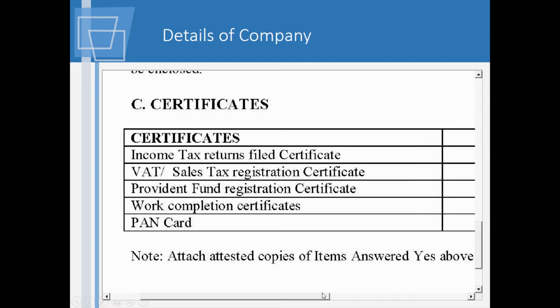And work completion certificate is like the course completion certificate which you would have heard of. The moment you finish the work, the work is completed, but the company to which you executed the work may not have released the full payment because it might be within the performance guarantee period or something like that. So it means that you have finished the work and you come out of the site. At that time, you will get a work completion certificate. This is also one of the reasons why it will be very good if you can finish your work in time and come out of a particular job.